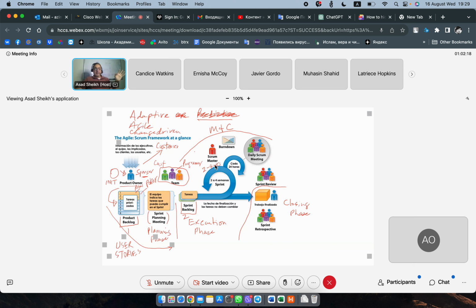It's maybe decided, for example, that they just want to take on the first 5 of these user stories, out of the 8. The team decides this by working with the product owner and the customer, based on the value they're going to produce and on what the customer wants done first in the first sprint. So this is the first sprint here. You may have 50 sprints. This is the first one. So they're going to do five of these user stories.